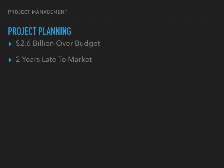There's no other way to look at the C-Series project management other than a pure failure. The first issue is the infinite loading of the research and development teams as they were tasked with several projects at the same time. For example, the Learjet 85 and the Global 7000 projects were both run concurrently alongside the C-Series project. This both put a financial and manpower strain on the company that ultimately had to be overcome by a government bailout.